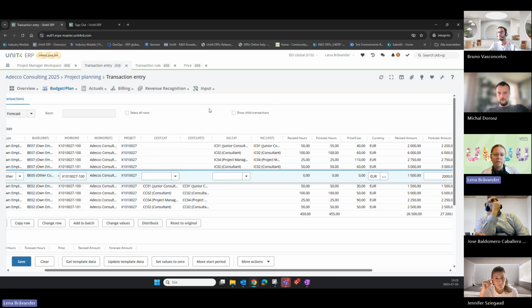If we could have that transferred from the planning by resource in terms of how many hours I plan to work, then I think that's when we would like to have it by resource. Okay, and that works by aggregated income category. So 10 juniors, 5 consultants, like that, right? So it's just calculating the number of the type of resource and their costs, and that is what I can then report and monitor.